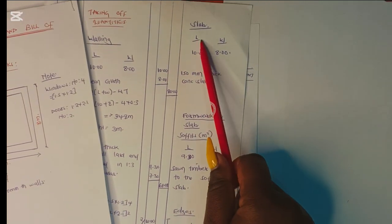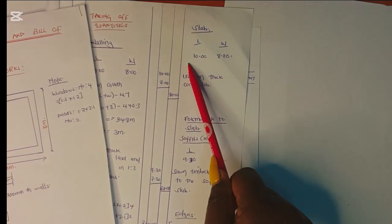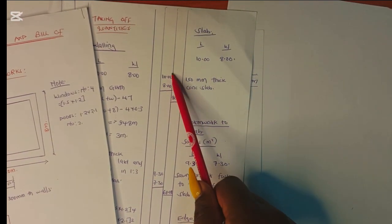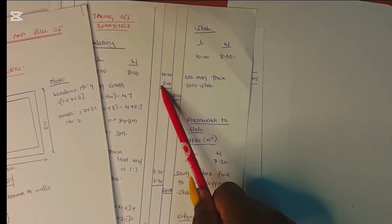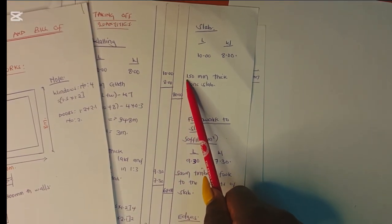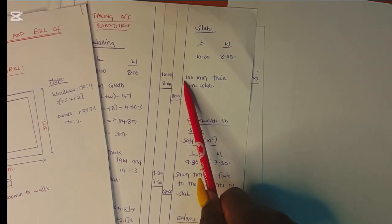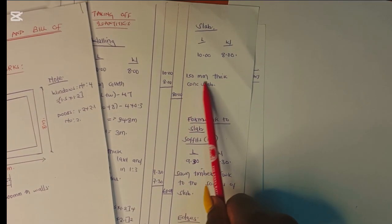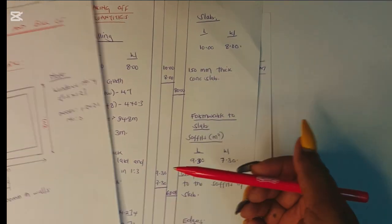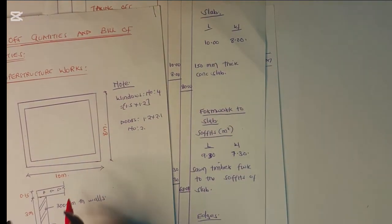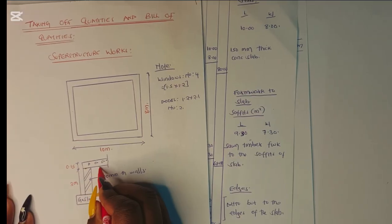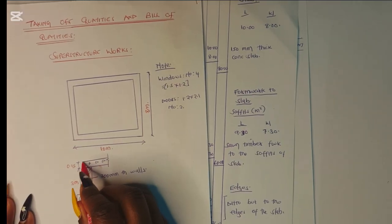Now let's book the slab. For the slab we book it in square meters — the length was 10 and the width was 8, giving us 10.00 by 8.00, which is 80 square meters. This is a 150 millimeter thick concrete slab. There is also formwork to this slab — formwork to the soffit at the bottom and to the edges.